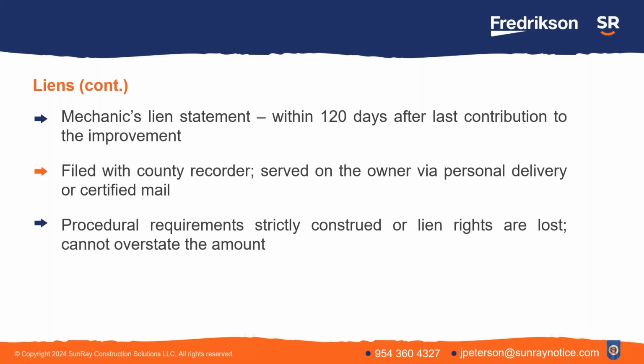If you miss it, you can't restart the 120-day clock by going back and doing a little bit of piddly work. That's called the screen door doctrine. And the name came from contractors would go back because they missed their 120-day deadline from when they last finished their actual work. They'd go back and they'd fidget with the hinges on the screen door and they'd say, oh, well, we did more work, so now we have a fresh 120 days, so we still get our lien. And the courts in Minnesota said, that doesn't work. If you're done with your work, you can't go back and do little pieces of punch list work here or there to try to restart your 120 days. So keep that in mind.